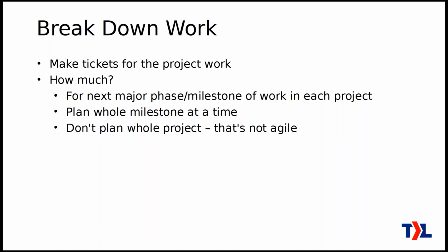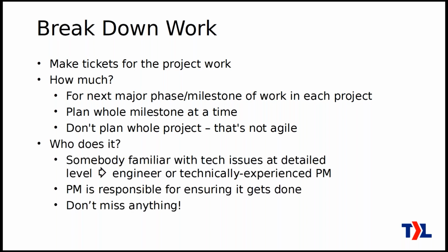We're not going to plan all of it because that's not very agile. You might get through the first phase and then realize that what you did in the first phase means the last phase isn't necessary, or maybe you need a lot more than you previously thought. But because you did that planning work, it's now wasted. If we just left it until later, you wouldn't have done it, and it wouldn't have been wasted. So that's why we recommend only doing it for the next phase. But why we recommend the entire phase is that we don't want to miss anything. That's a key thing, and one of the main things that can blow up your projects is missing entire sections of work.